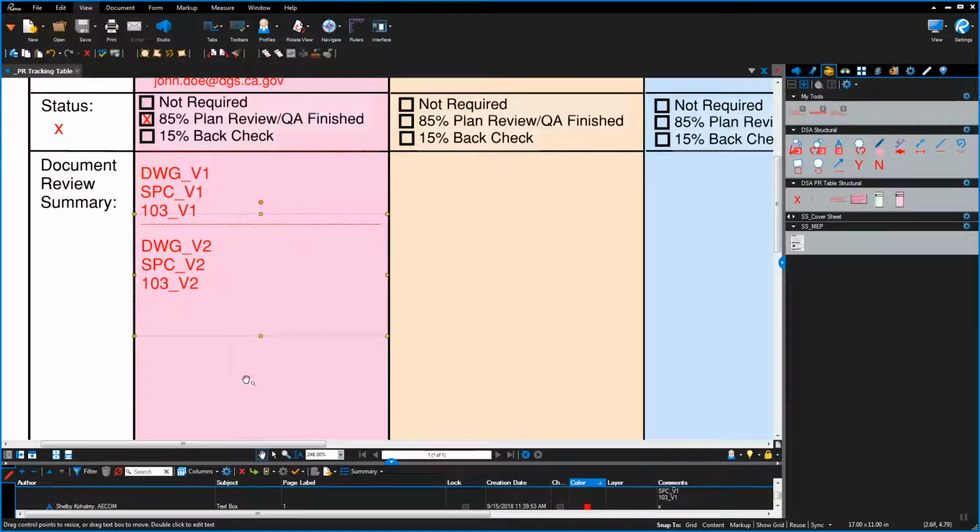If the current review file is approved, add an _A to the file name. If the current review file is approved as corrected, add an _as corrected to the document file name. If the current review file has no more outstanding items, provide a strike-through to the file name.